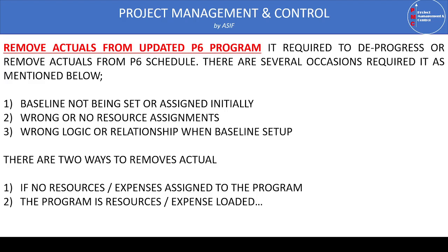When removing actuals or de-progressing a program of works in P6, there are two methods — two cases. The first case is where the program is simple, meaning it is not resource and expense loaded. In this case, it's very easy: we go to activities that are completed or in progress and change their status to 'Not Started'.